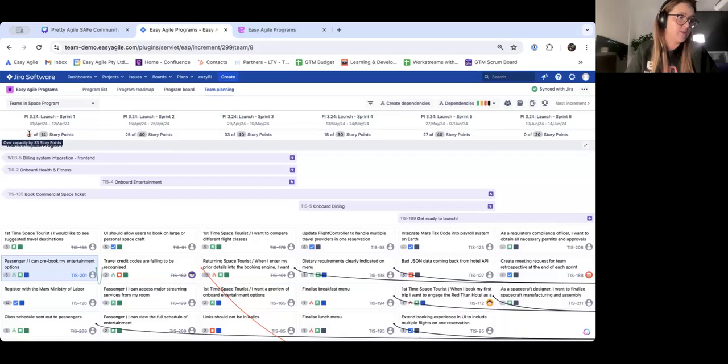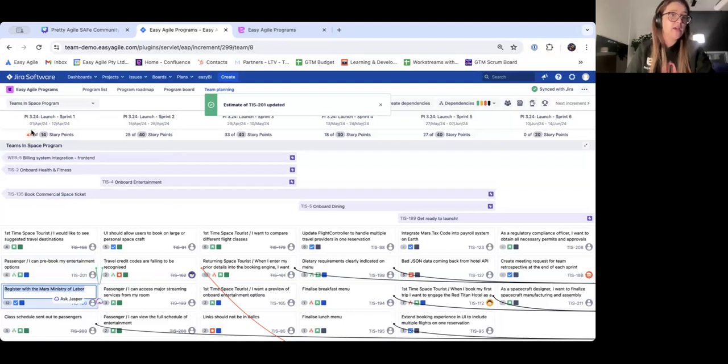And estimates can be directly added to each issue. As I said, we've got a little pillbox here as well, so you can estimate each of your issues below the sprint. And as I said, that will calculate up to tally at the top under the sprint as well.